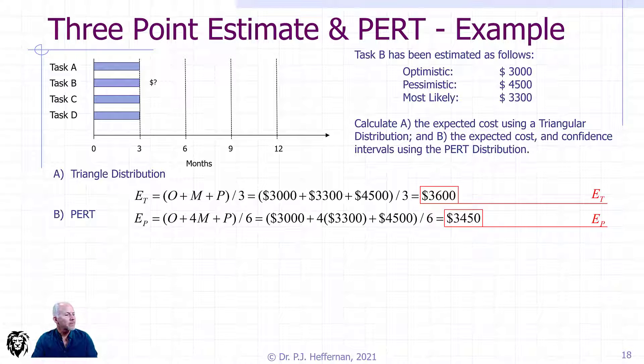For PERT, it's that weighted average. We have the coefficient of four before the mean. So we have our optimistic plus four times our most likely plus our pessimistic. And now we have to divide by six because we have the four before the most likely. And we come up with a slightly different answer as our best estimate for the task of $3,450.